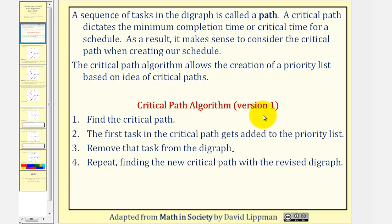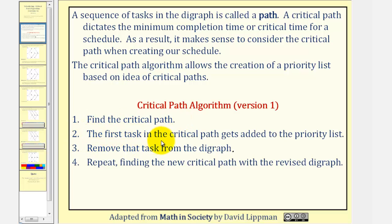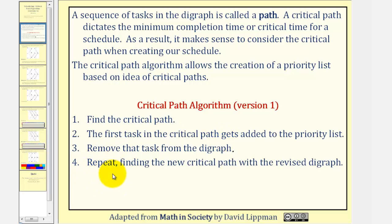Here are the steps for version one of the Critical Path Algorithm. Step one: find the critical path. Step two: the first task in the critical path gets added to the priority list. Step three: we remove that task from the digraph. Step four: we repeat the process, finding the new critical path with the revised digraph.